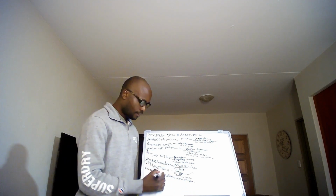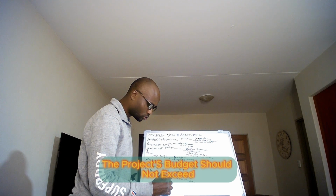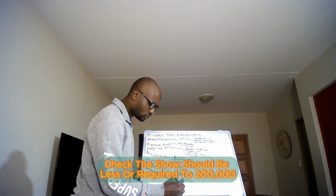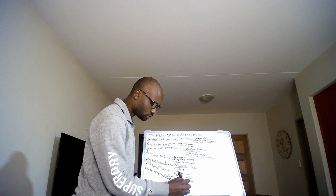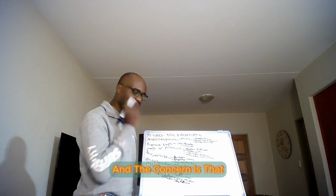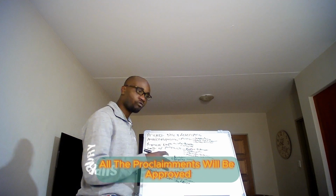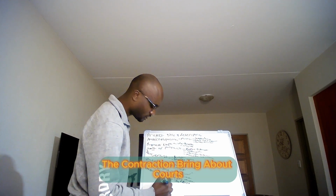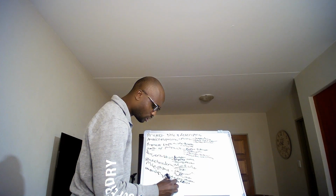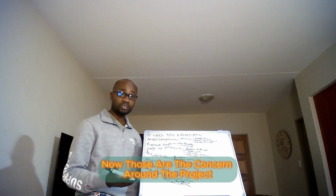So you can also add to say the project budget should not exceed, should be less than or equal to 200,000 megs. That is our constraint. Another constraint is that all the procurements will be approved by the Johnson family. The contractor can bring about quotes, but the Johnson family actually will approve all the procurement activities. Now, those are the constraints around the project.